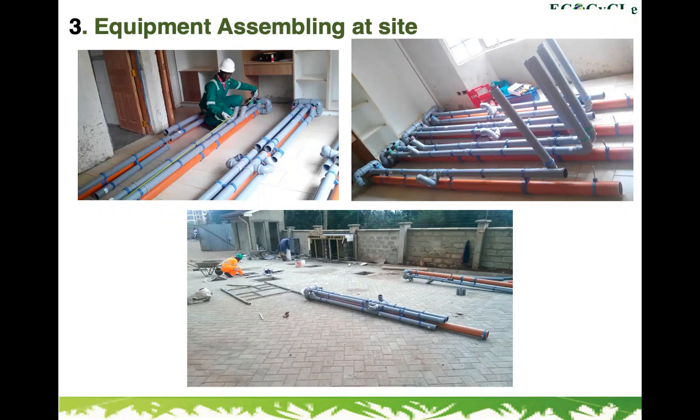Okay, thank you. So once you have your tank constructed, our team always come to your site now to do the actual installation. The first step that we do in the actual installation is ensuring that everything we deliver to your site is up to the specification that we designed. For example, you can see in that picture, one of our technical members is trying to measure the pipes to ensure that they're to the correct height and everything is met to the correct specifications according to the designs.